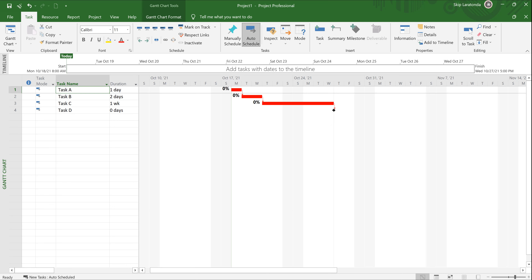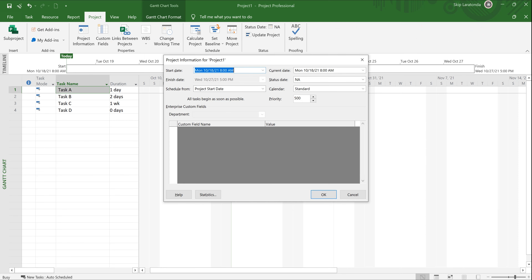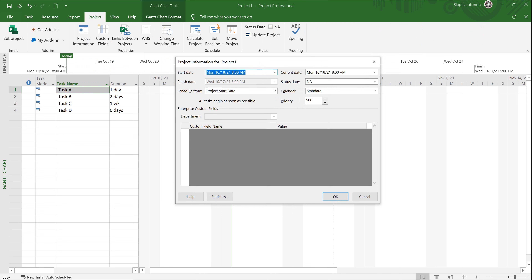The next thing is to schedule a start time. Under the Project menu, click Project Information. Notice you can schedule from a start date or from a finish date. If you schedule from a finish date, you can type in a finish date and it will calculate the start date based on your durations — that's why the start date field is grayed out in that mode.